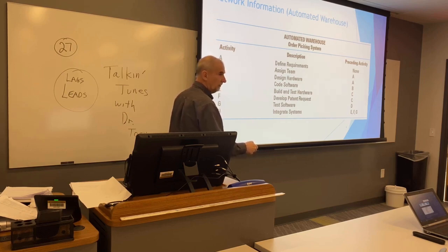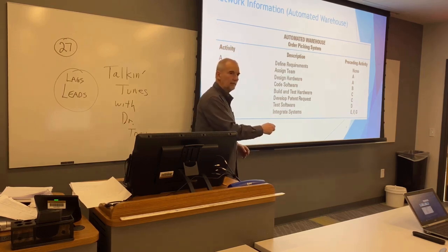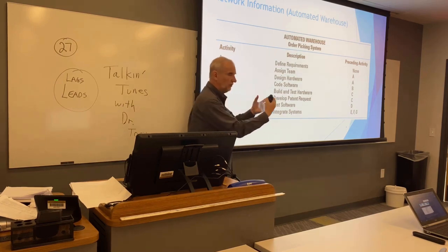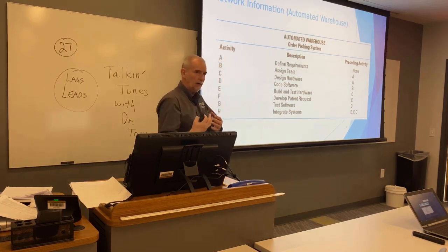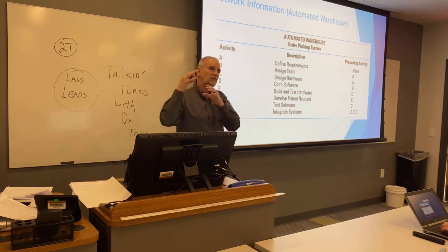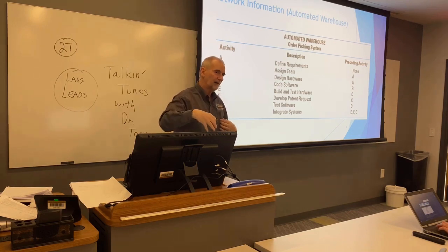That's true. But if you're doing E, you're only dependent upon C, and for C to be done, it has to be complete, and it was dependent upon A. You follow that? C's already consumed A's work. It's already there. So you just need to be concerned about what's happening right before that hasn't been done yet.